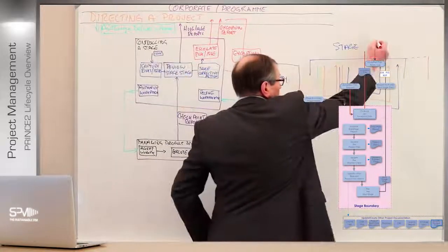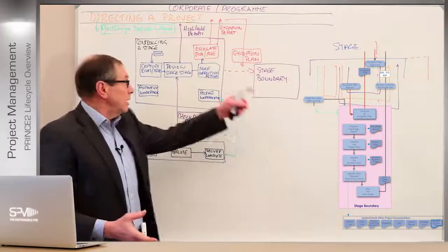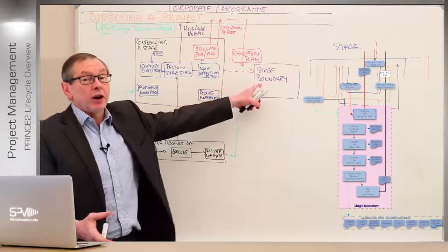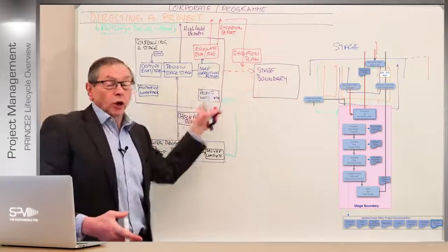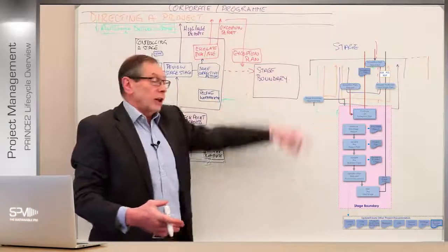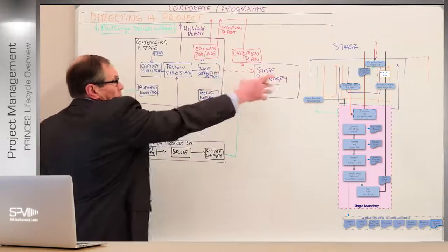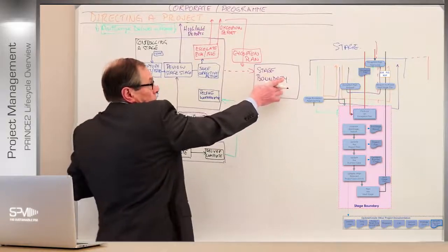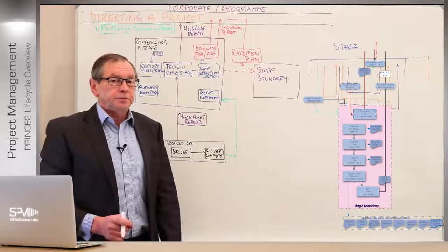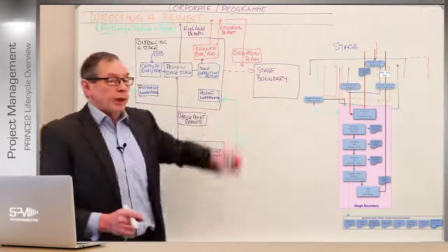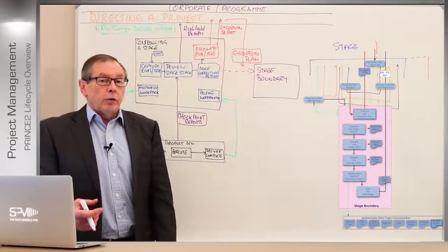It might be that you're here and you've got to chop it at that point. That's why you have a boundary, because technically your current stage plan is no longer viable. I'm at the boundary temporarily while the plan gets authorized. If it's lengthening it, then that's what the action will be, and we would go back to carrying on. If we've finished the stage, we stay at the boundary, shut that stage down and update all the documents. Then they'll approve it and take action from there onwards.